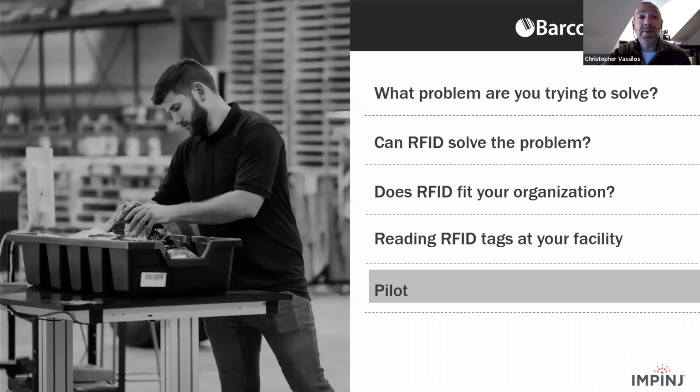Absolutely. And even things that seem simple, as a comment on that too, can become more nuanced. At a bare minimum, if it's not something that makes RFID too challenging, it's something to solve for. So for example, frequently we are in a facility with what we feel is, again, our bread and butter, shipment verification at dock doors, and we even have photos. But once we get on site, we find that perhaps there's a large metal wall by the last dock door, and that's not a problem that we can't solve, but it is something we need to solve for. It could be that somehow we missed that half of the dock doors have dock plates and half don't, and that can actually affect the configuration, the antenna configuration, and power settings. So it might not be that every dock door gets the same configuration, for example. Exactly.